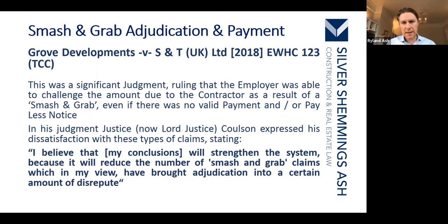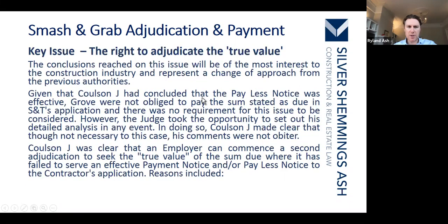So he really left a legacy there before he moved up to the Court of Appeal, saying, "I believe that my conclusions will strengthen the system because it will reduce the number of smash and grab adjudications, which in my view have brought adjudication into a certain amount of disrepute." So the idea of smash and grab adjudications lives on, but it's certainly been watered down in the sense that in this judgment, it was decided that you could also, subsequent to the smash and grab argument, look at the true merits of the same valuation.